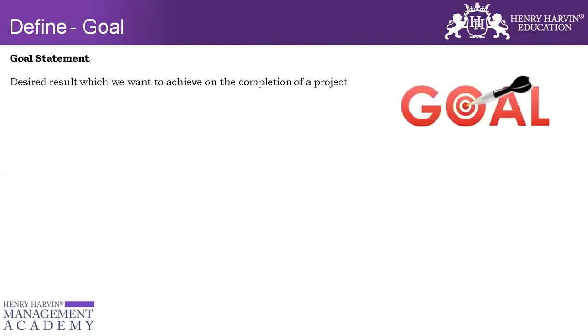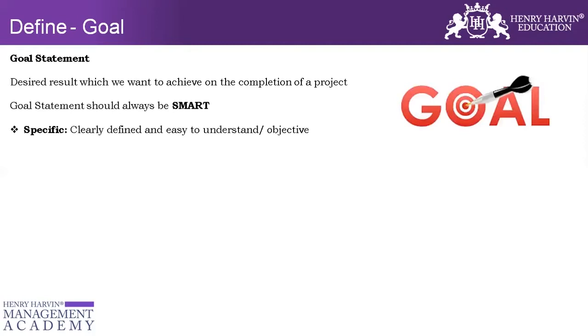To remove any sort of ambiguity, there is an approach we use in the goal statement, and that approach is known as the SMART goal. S stands for Specific — it's clearly defined and easy to understand so that everybody understands what the goal is. It should be Measurable — that's why it reaches a stage where I want to reduce from 10% to 5%.